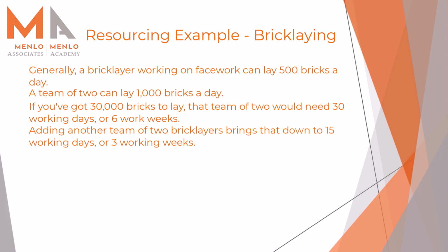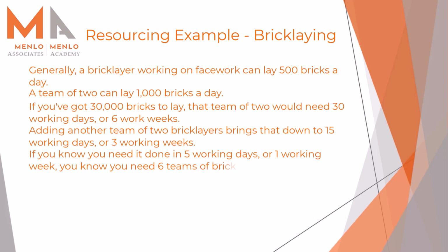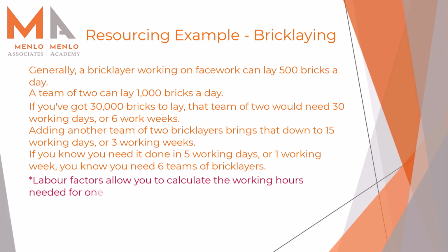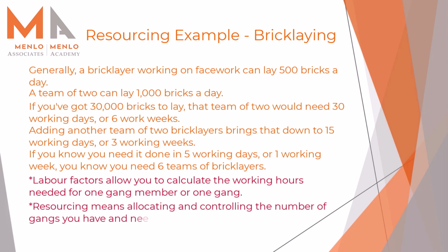And if you don't have 3 weeks to get the work done, then 6 teams will get it done in a week, provided you have enough work faces available without them getting in each other's way. So it's not just the labour factors that are vital to your duration calculations. Remember, labour factors allow you to estimate how long it would take one gang member or gang to carry out the work. The way you resource your program after that, such as the number of gangs you allocate to tasks, will also heavily influence its duration.